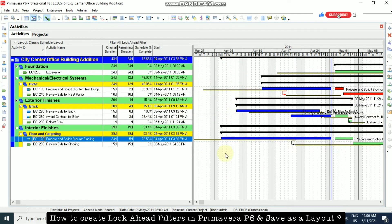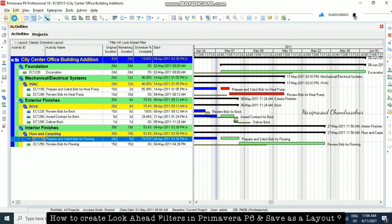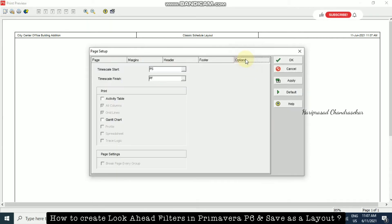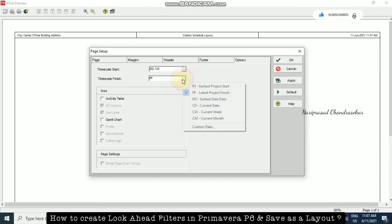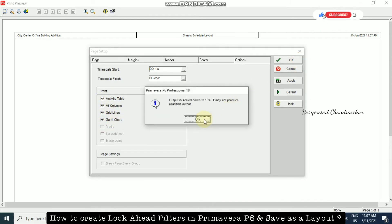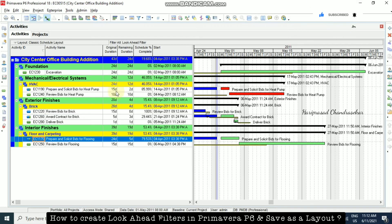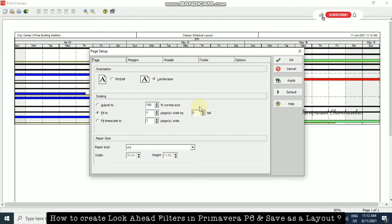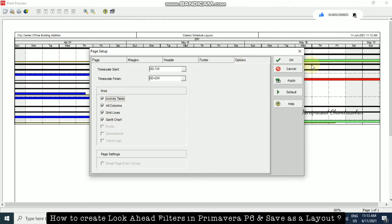Now we can go to Print Preview. From here, go to Page Setup, then Options, and set the timescale start as DD minus 1 week, and end as DD plus 2 weeks. Select Activity Table and Gantt Chart, and click OK. If the output is scaled too small, go back to Page Setup and choose Fit Time Scale to One Page Wide, select Activity Table option, and click OK.